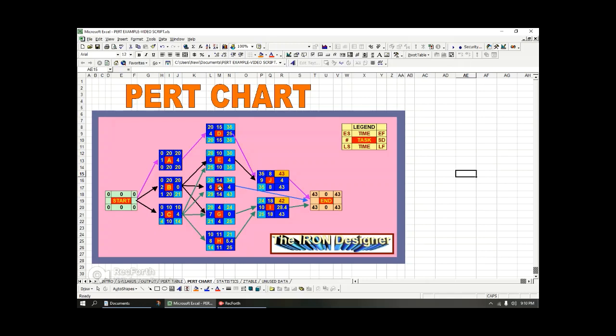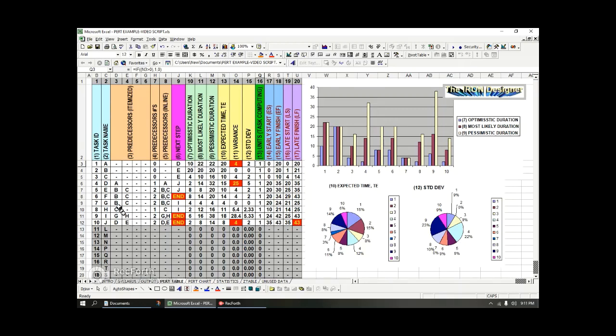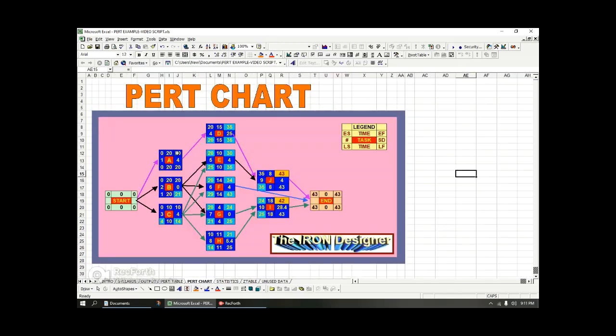Quickly, I just want to show you that once you've completed F, that goes straight to end. It doesn't mean the project is done, but F doesn't have any further tasks after it. Okay, nothing depends on F. And we can confirm that by looking here. You don't see F in any subsequent rows. There's no letter F anymore. So F goes to the end, okay?